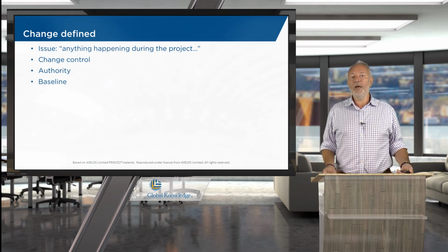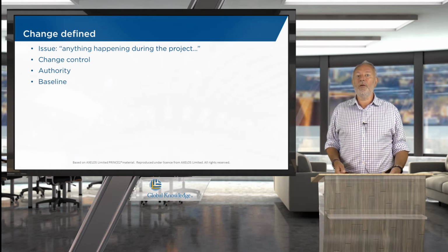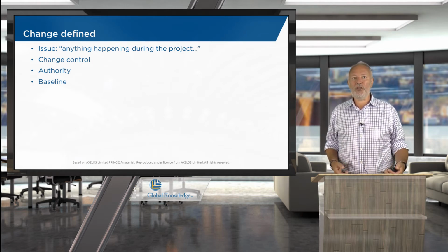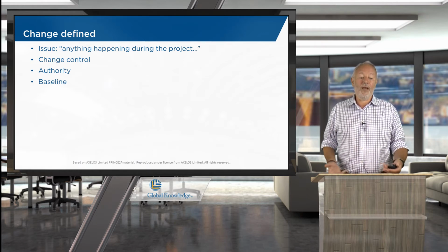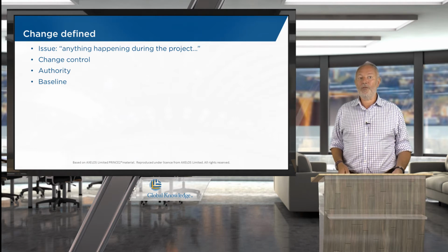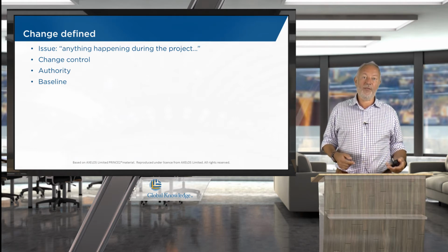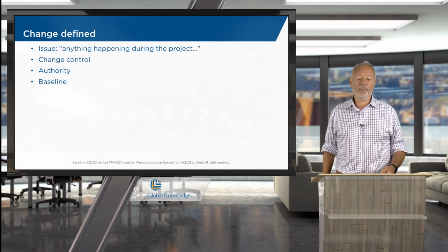All other issues are about problems or concerns. Anything else to do with personnel or location or weather or whatever else it happens to be is put together in the problems or concerns. So we're focusing in on the products for the request for change and the off specification, and all others are captured in problem or concern.